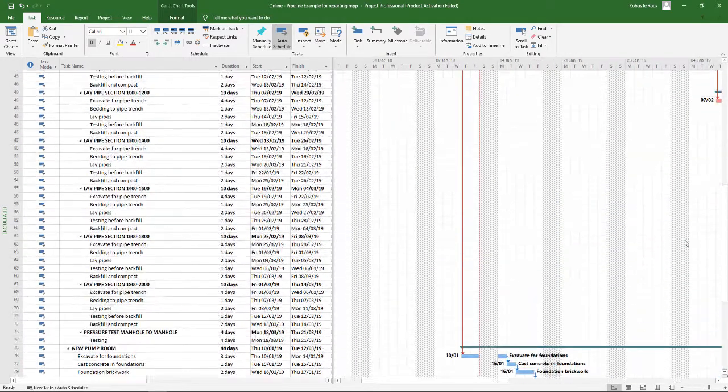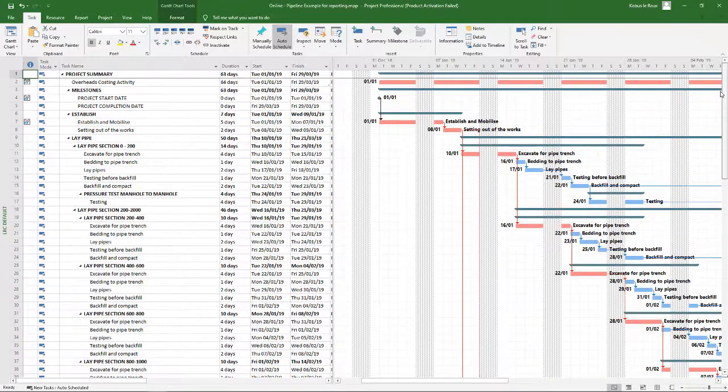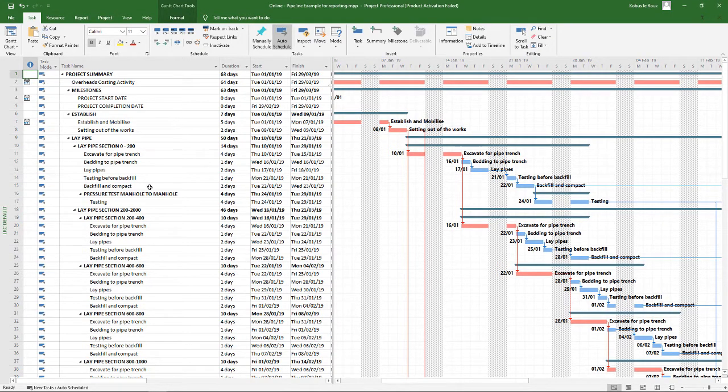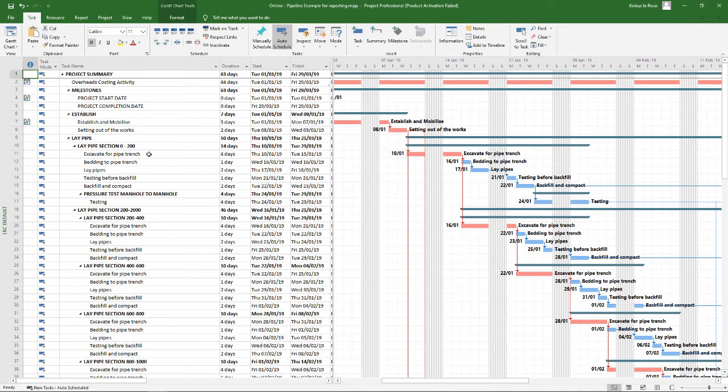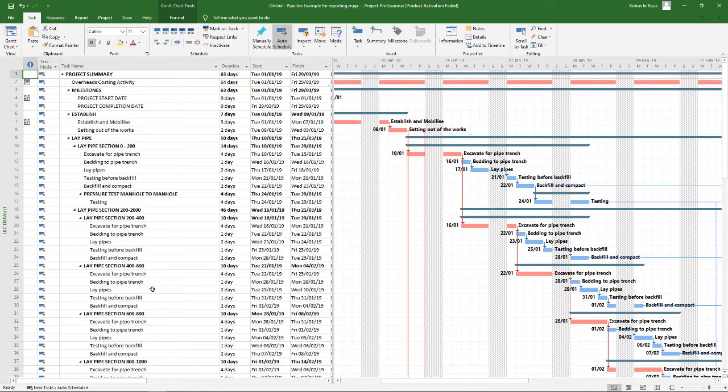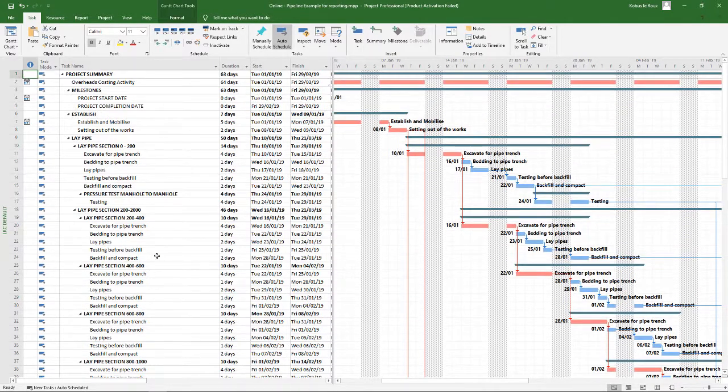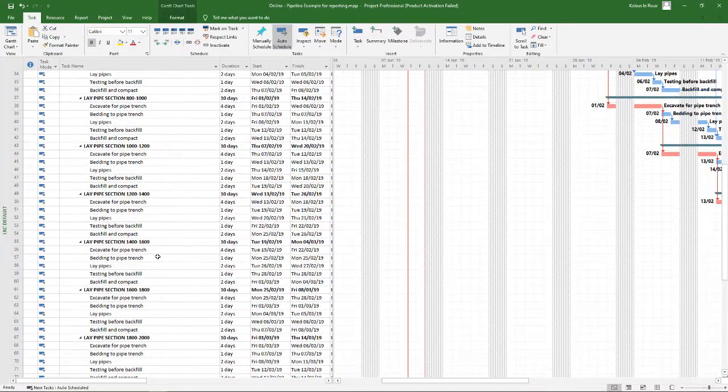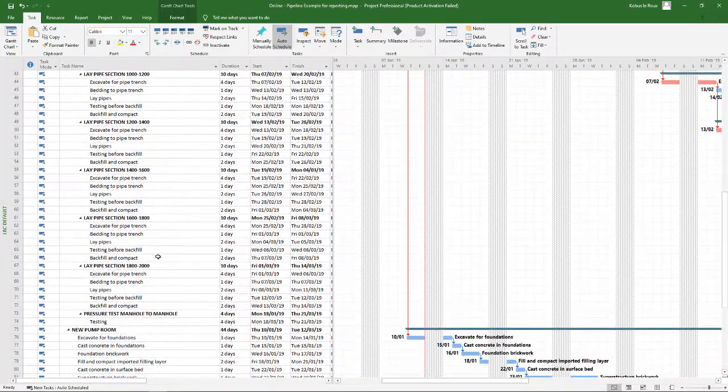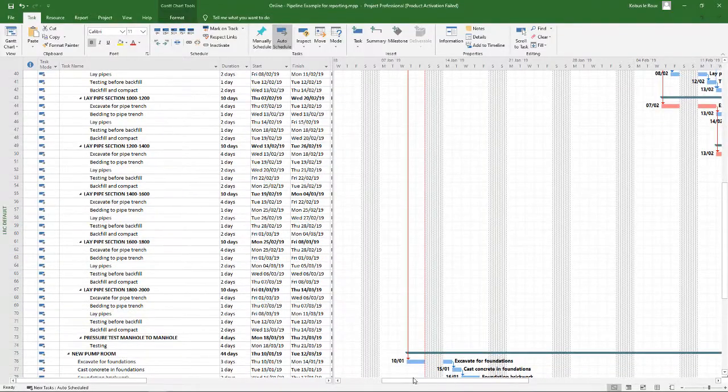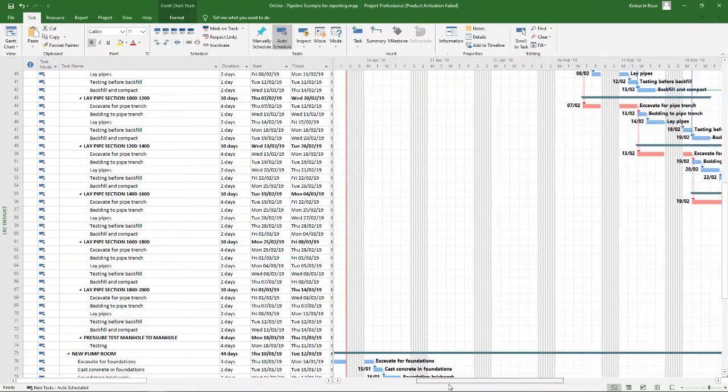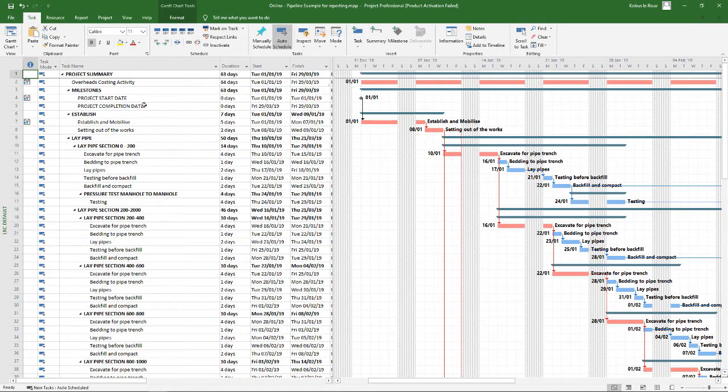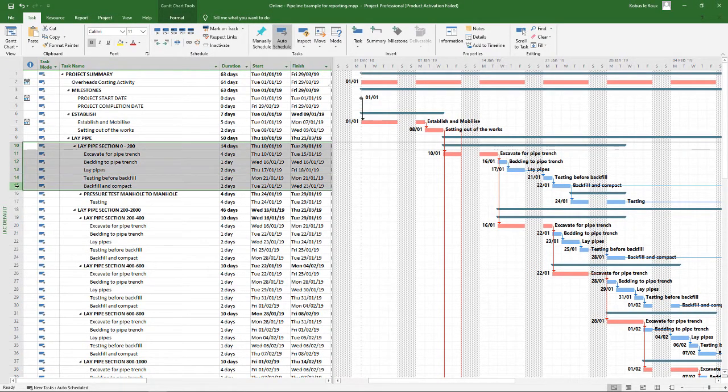So quite a simple schedule. Now let's look at the activities. If we take the laying of the pipe section, this is one of those pro tips that I always give young schedulers: focus on that laying of the pipe section in detail, finish it up in terms of days, resources, links and everything. Then you can simply copy and paste that down into your other sections. So you do the work once, and the same thing will apply to all the other sections. It looks like a midsize schedule, but it's actually not a lot of work if you focus on one section at a time.